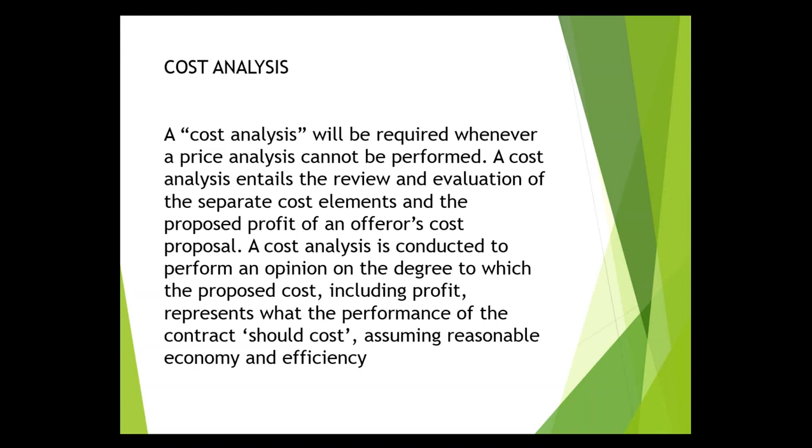Also, a cost analysis is used when a product or service being offered you can't really evaluate against other commercially available items or similar products or services. Examples of this would include procurement for professional services where no competing price proposals are submitted. So this would happen if you had an RFP and you only had one bidder, and you've gone through everything and seen that everything else in your procurement is good. You've advertised long enough and in enough different areas, enough different sources have been advertised. You've reached out to vendors, but you only have one single source.